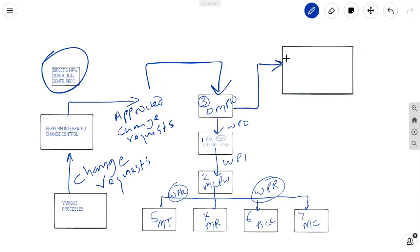When you get a request to rework something, redo something, redo the budget, redo the schedule, redo whatever it is, there is an integrative factor involved. You are doing work. You are not necessarily planning just yet. You are doing work. Because if someone asks for a re-quote or someone asks for a reschedule or someone asks you to re-scope, there is a possibility that that scope may not be accepted. That new estimate may not be accepted. So, you have to look at it as work.